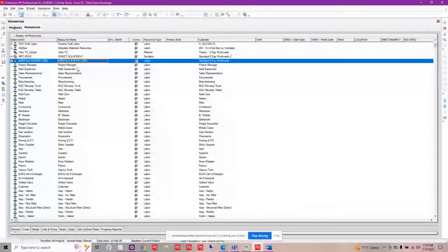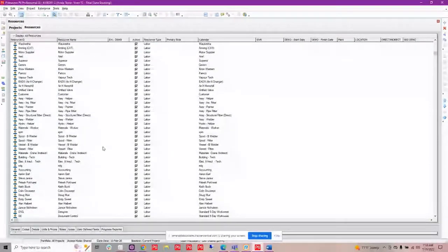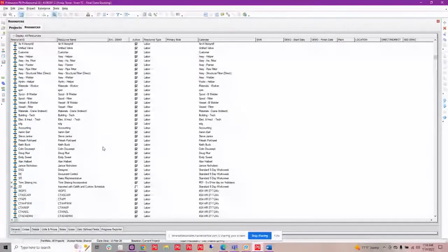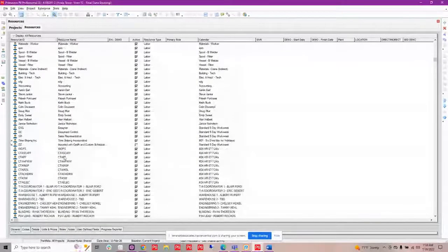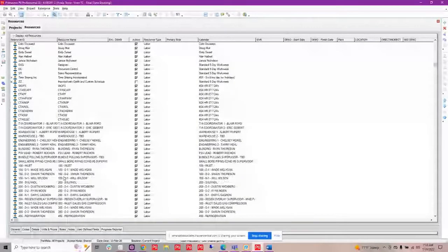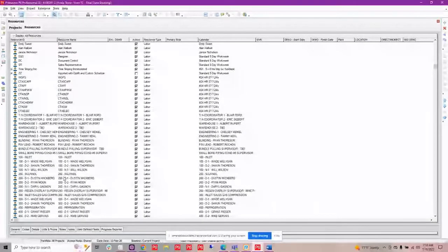And so they're just kind of lined up, and you don't really know what XER or what project they're associated with. And when you import, this is what happens. It comes in and it just simply lines them up and doesn't put them in any type of structure at all. And not only do I have these ones up top here, but I also have these ones down at the bottom. And so this can become very, very messy and not very useful in your database.